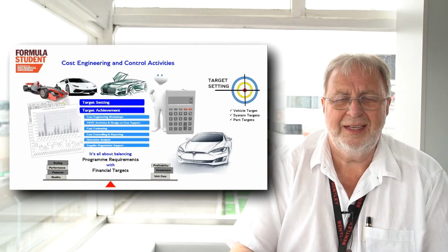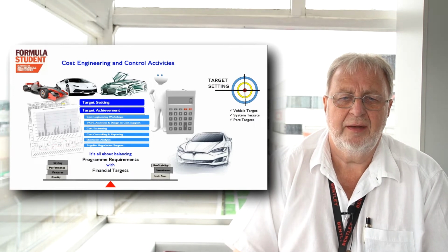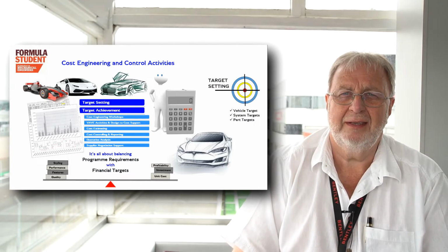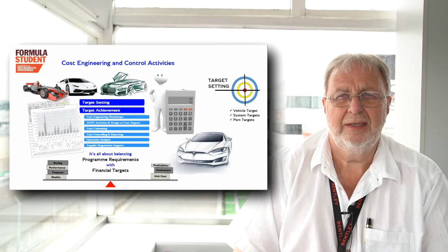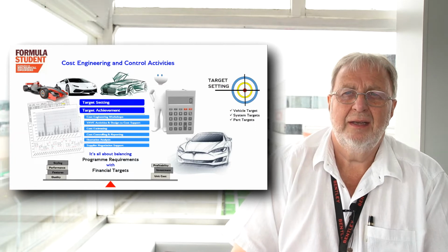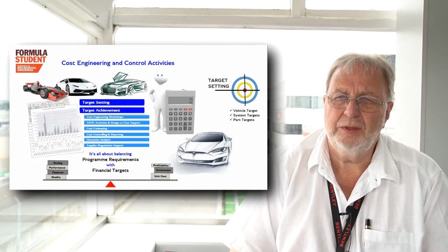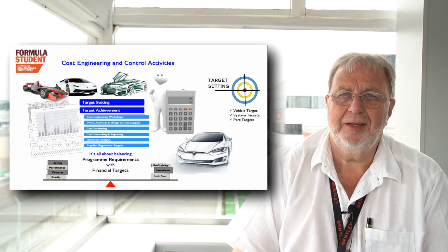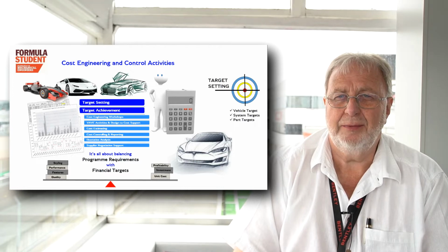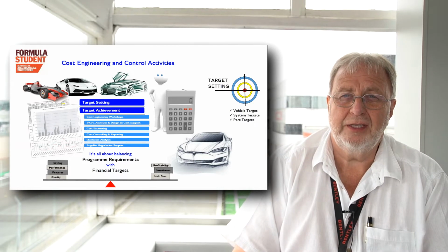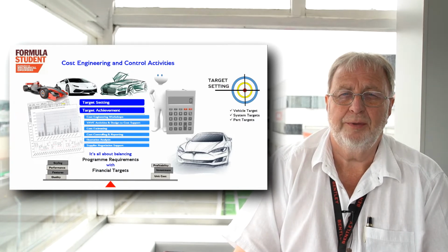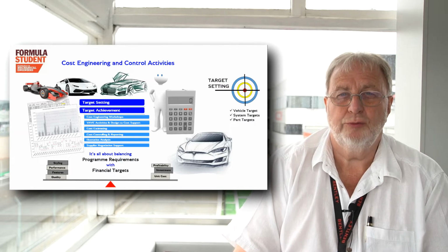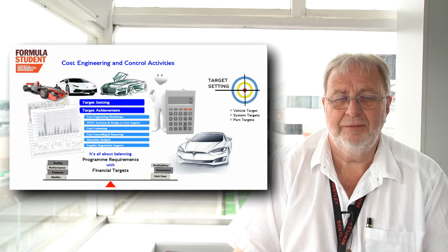Okay, the key cost engineering activities involve target setting, first of all, and getting that right, because if the target that you set for your project is too high and the business goes ahead, well, in fact, it wouldn't go ahead, because if it's too high, the chances are that the board of management or whoever's looking at the project would cancel that project, because they don't see any profit at the end of the day. If you put your estimates and targets too low, and it looks as though you could make a fair profit for the program, and it goes ahead and it's wrong, your business can fold very easily.